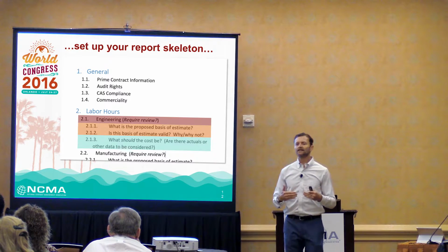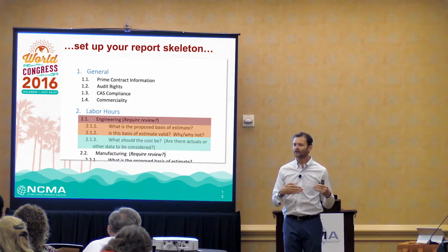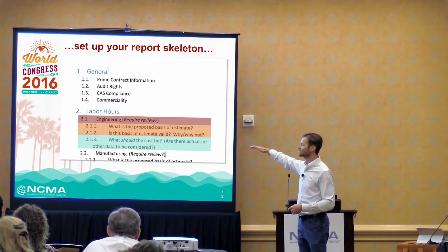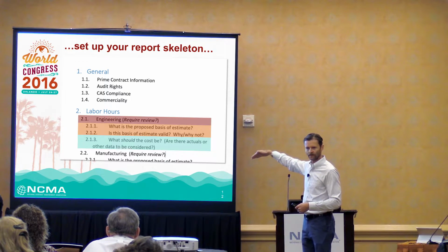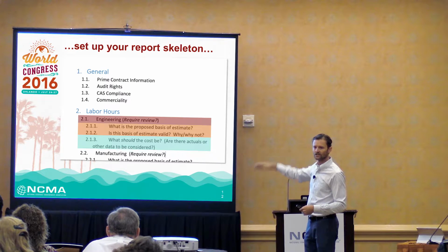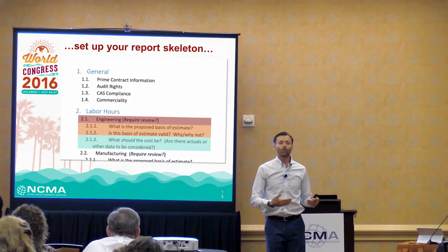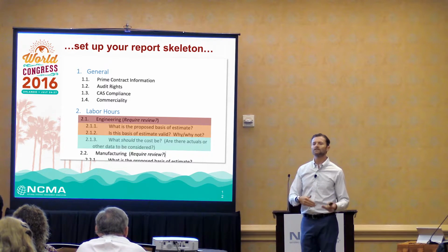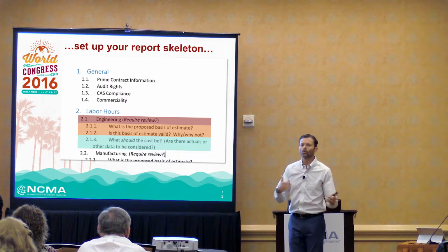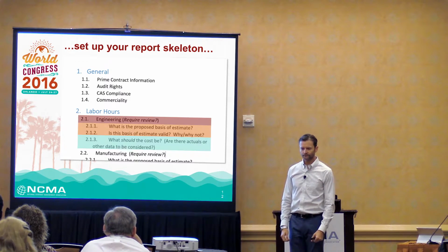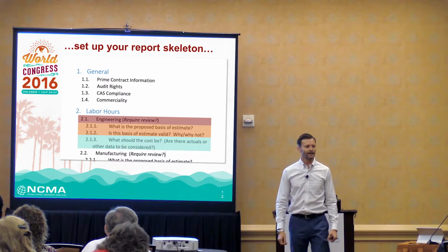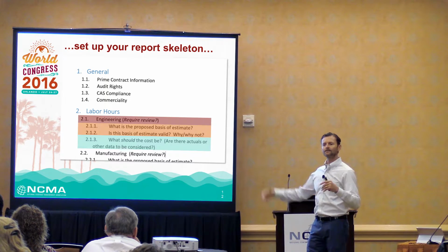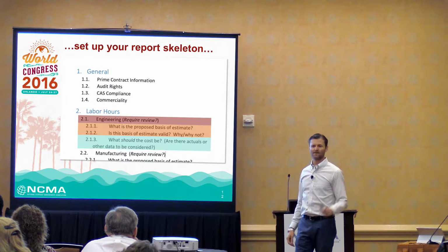So if you're being asked for something, make sure that you understand why they're asking for it, right? This is what they're trying to get to. They need to understand your proposal basis of estimate. They need to make a determination on whether or not that's valid and then come up with their own determination. Now, oftentimes you're going to say, well, we based it on engineering judgment. And it was based on a 2x of whatever. You come up with this great basis of estimate. And what you see from your government customer is they come back and they say, yeah, thank you. What are the actuals from over here? And it seems like, okay, I told you my basis of estimate. That's not my basis of estimate.